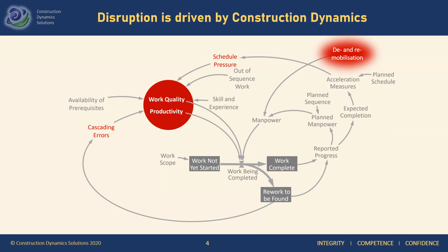As we said, a couple of months later, you'll start to remobilize. But not all crews will remobilize at the same speed. So that now, even though you may, for example, have already back half of your workforce, only half of that may be able to work fully efficiently, because the other ones will depend on people that are not there yet. Again, you will be disrupted.